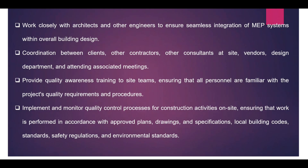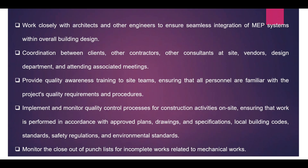Implement and monitor quality control processes for construction activities on site, ensuring that work is performed in accordance with approved plans, drawings, and specifications, local building codes, standards, safety regulations, and environmental standards. Finally, monitor the closeout of the punch list for incomplete mechanical works — this typically happens at the end of the project, and it is your responsibility to monitor and close the punch list for proper handover of the project.